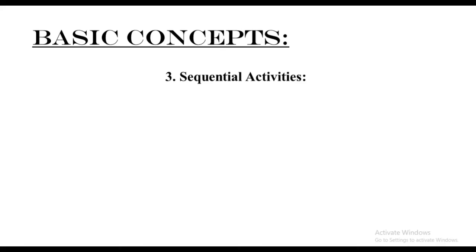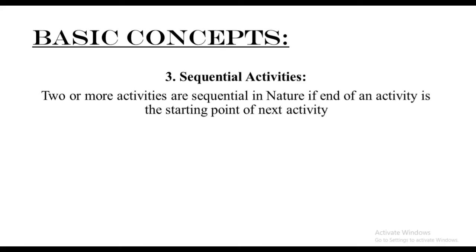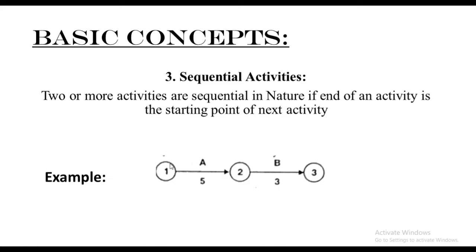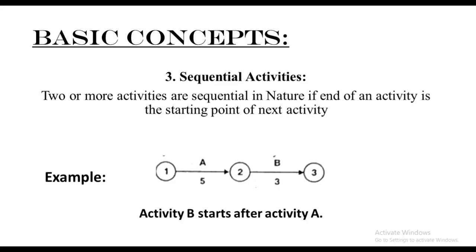Third: sequential activities. Two or more activities are sequential in nature if the end of an activity is the starting point of the next activity. For example, in the diagram we have the starting point of A which is node one, the end point of A which is node two, and in sequential order the end of A becomes the starting point of B, and event number three is the end point of B. So activity B starts after activity A. The starting point of the second activity will always be the end point of the first activity.